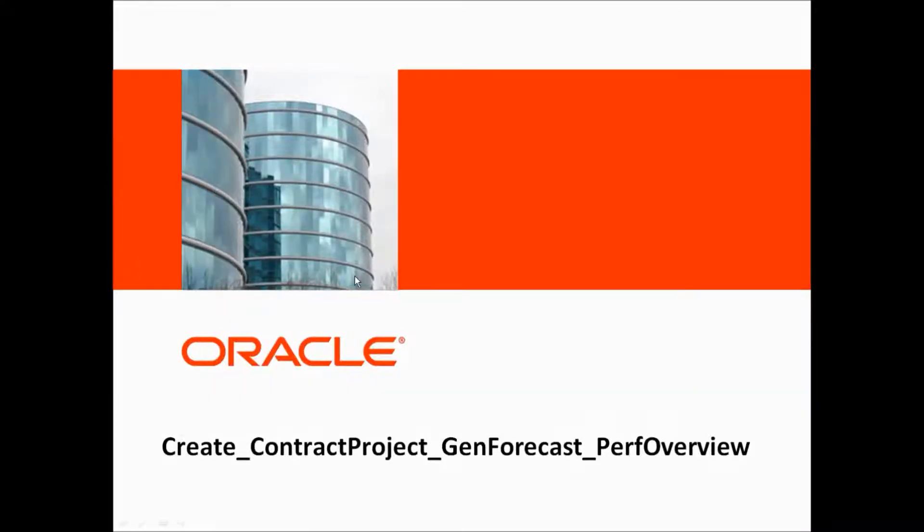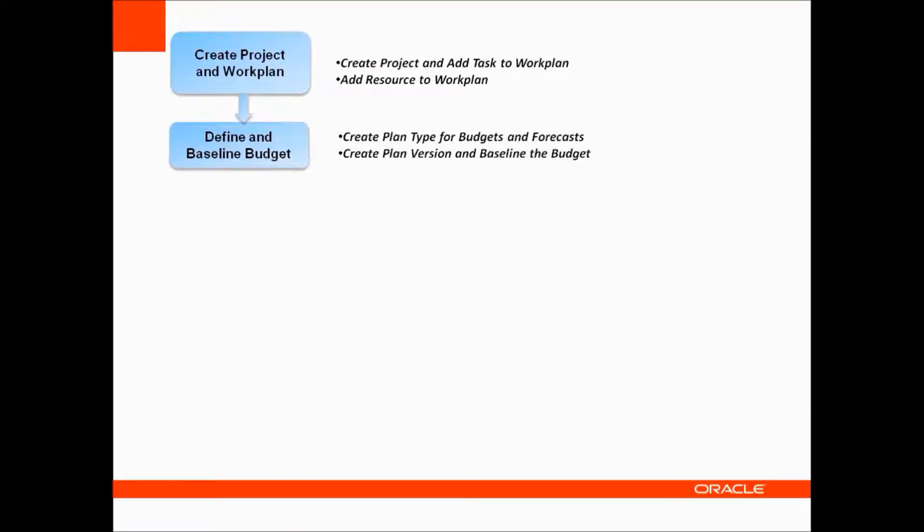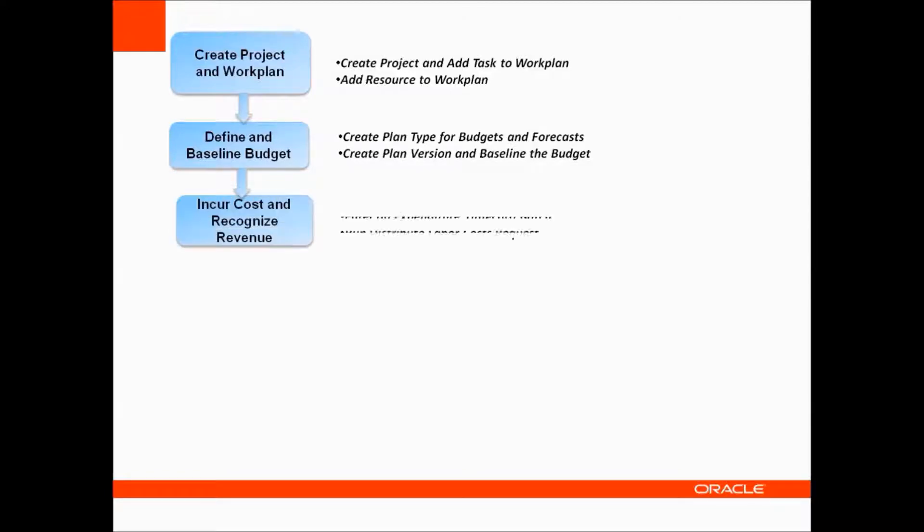The various steps are: Create project and work plan, Define and baseline budget, Incur cost and recognize revenue.